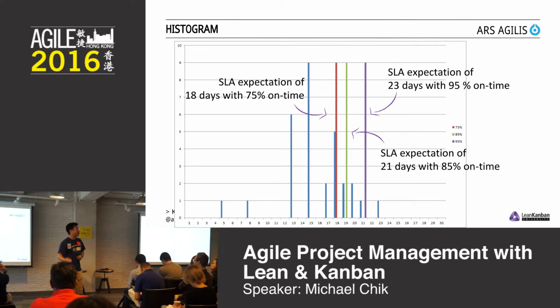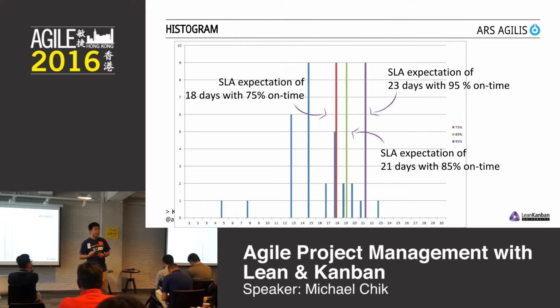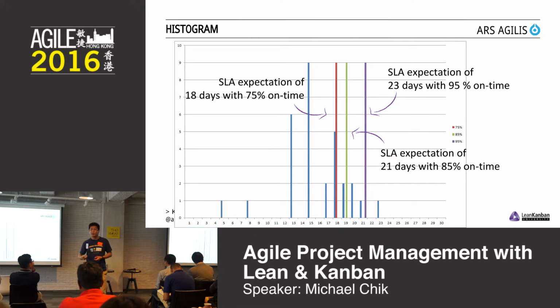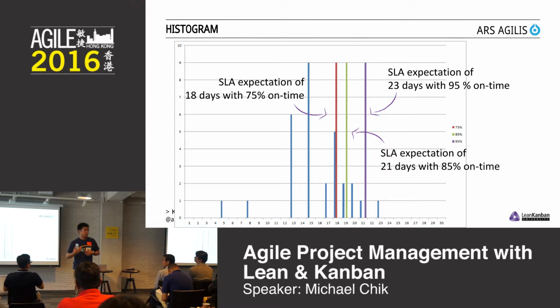If you're talking to your CEO and you definitely do not want to be wrong when you give him an estimate, you go to a higher percentile. But if you know you're talking to a stakeholder, well, it doesn't really matter if you get it wrong. Okay, going to 50% is always a bad idea. But maybe you go with 75%, or you go with 70%. Or you have a deadline, Christmas.